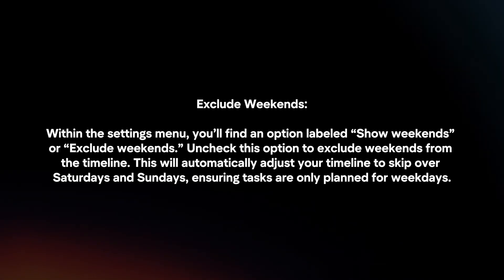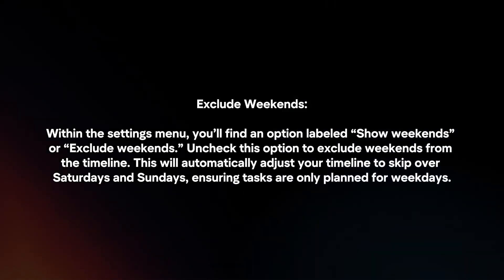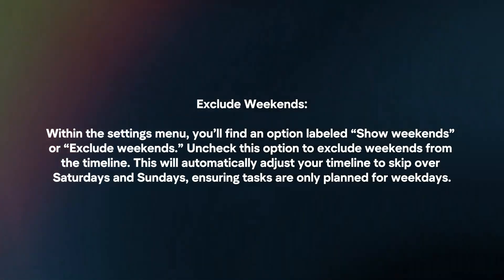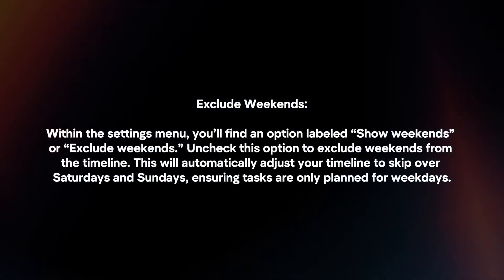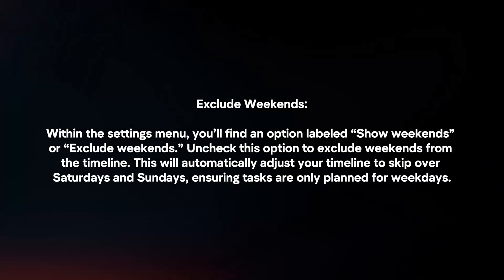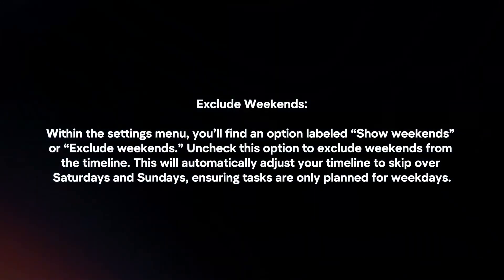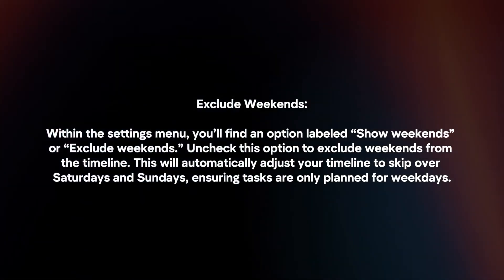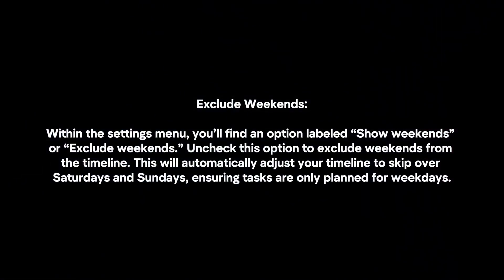Exclude weekends. Within the settings menu, you will find an option labeled Show weekends or Exclude weekends. Uncheck this option to exclude weekends from the timeline. This will automatically adjust your timeline to skip over Saturdays and Sundays, ensuring tasks are only planned for weekdays.